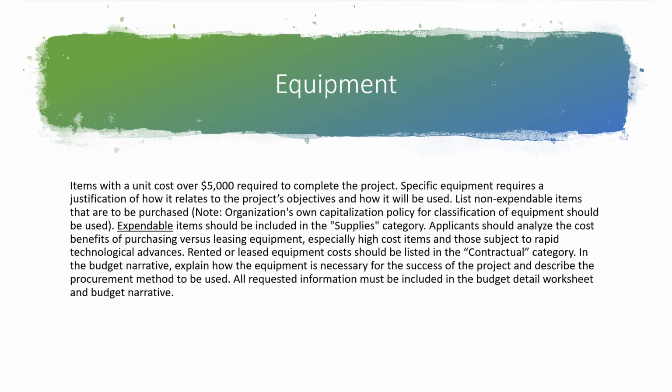Especially because a lot of technologies rapidly advance, and that piece of equipment may not be even useful for a long amount of time. But if you do decide to have rented or leased equipment rather than purchased equipment, you would include that in the contractual category, which we'll talk about in a minute.